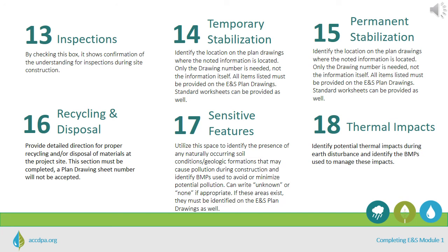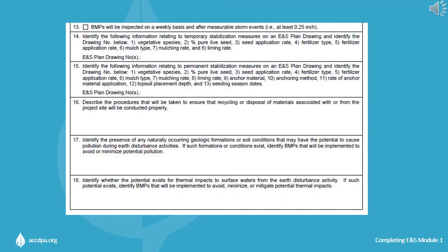Items 14 and 15 are where stabilization is addressed. In the space provided, identify the location on the plan drawings for both temporary and permanent stabilization where the noted information is located — only the drawing sheet number is needed, not the information itself. Many items are listed as necessary information that must be shown on the ENS plan drawings, which differs between Items 14 and 15, and can be used as a tool to double-check that all required information has been provided. Standard worksheets can be presented as well for applicable materials.